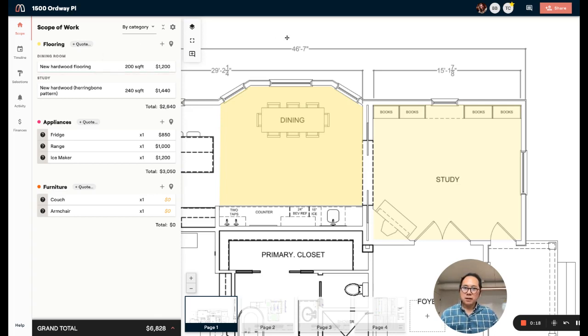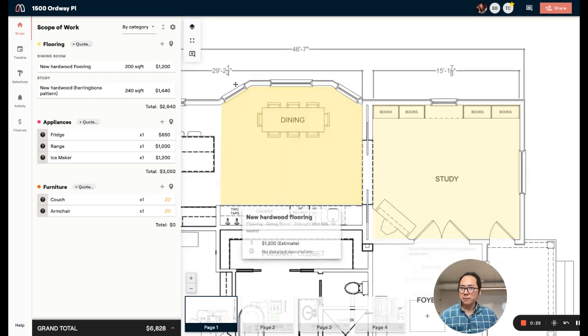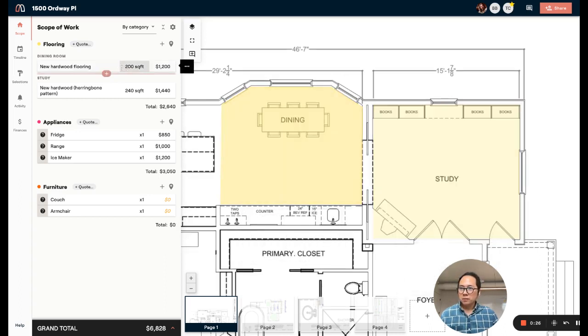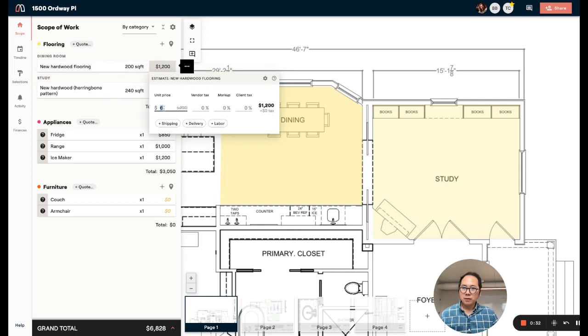In this case, I have a simple project with a little bit of scope for updating the floors in a dining room and a study. You can see here on the left, I've estimated about 200 square feet for the dining room and 240 for the study. I've put in my guess, which is $6 per foot for the materials.